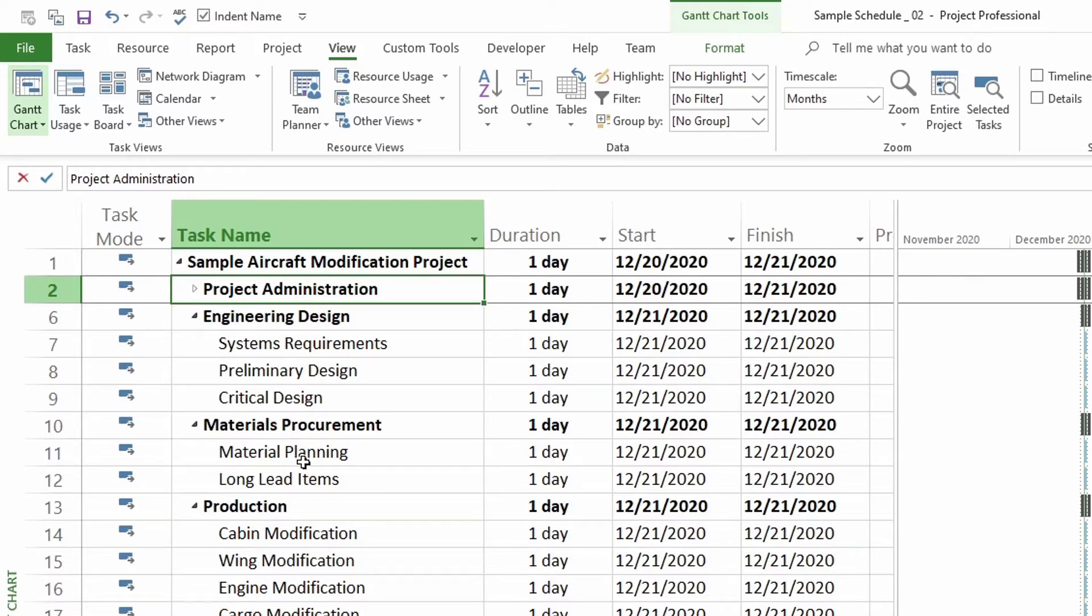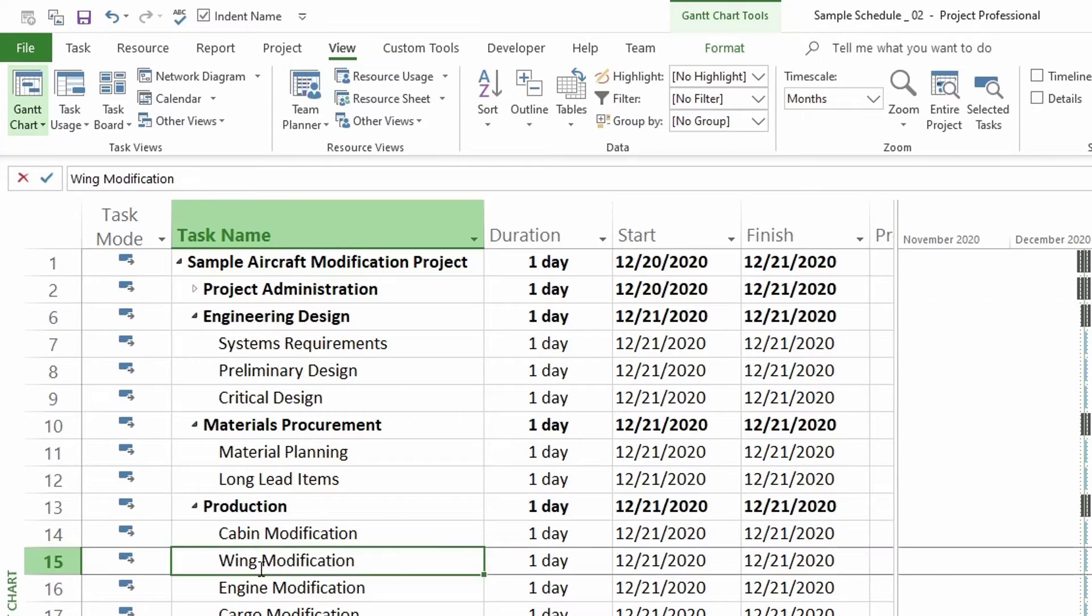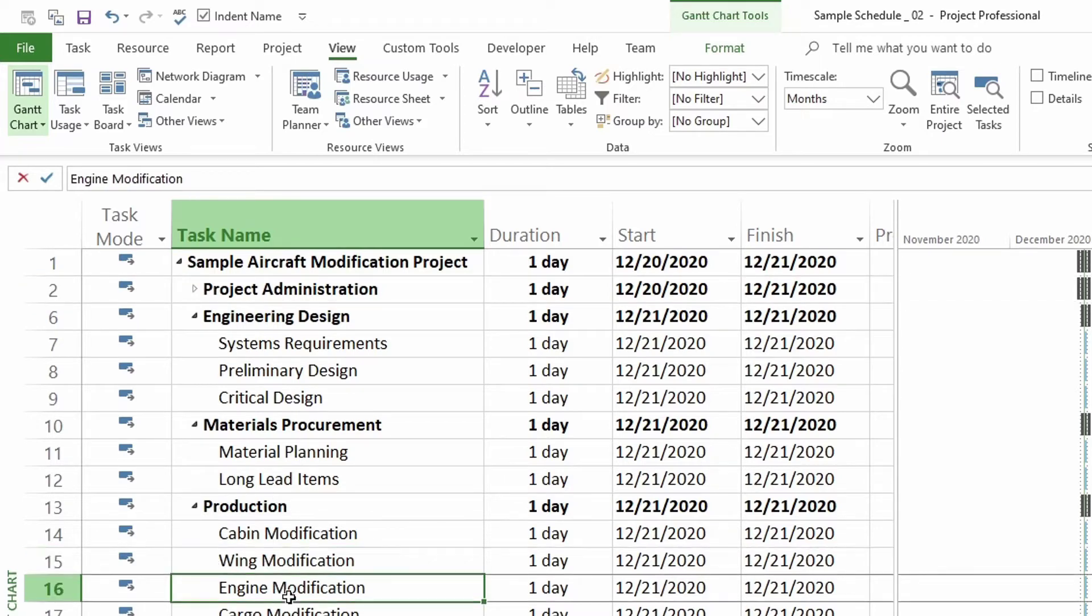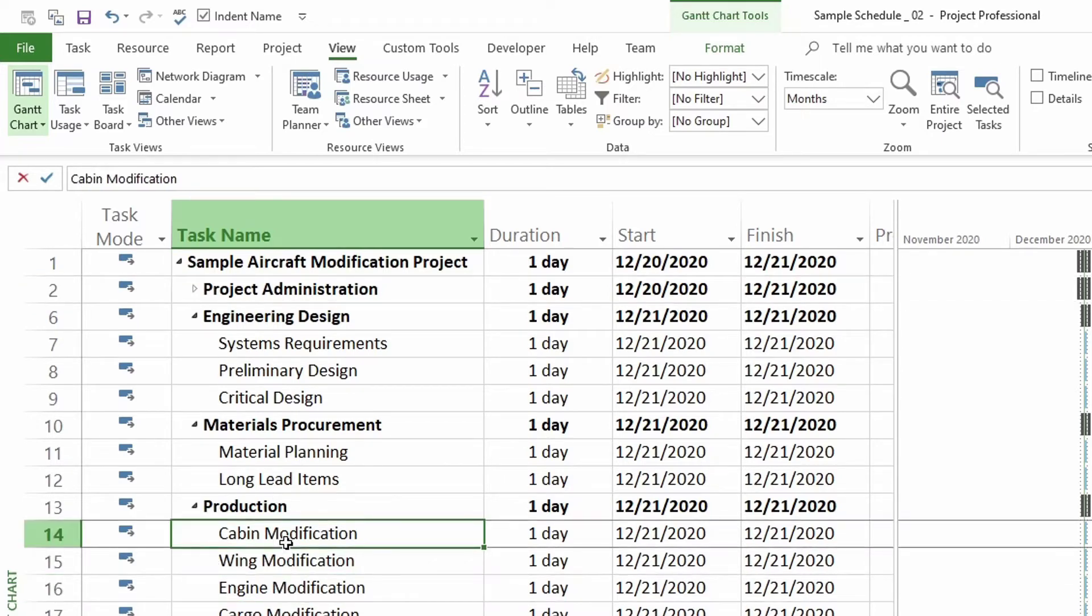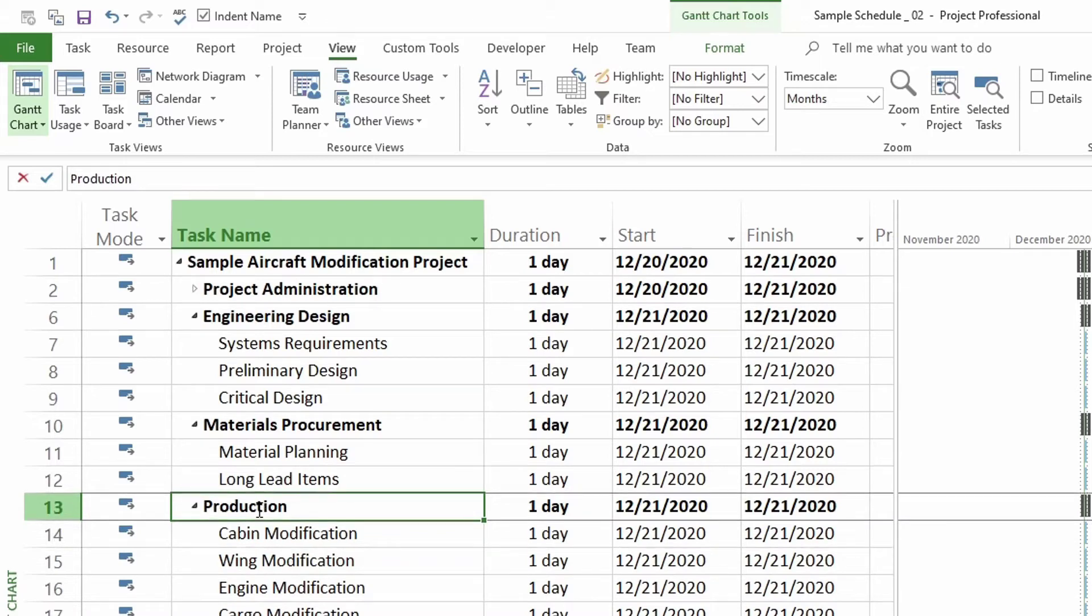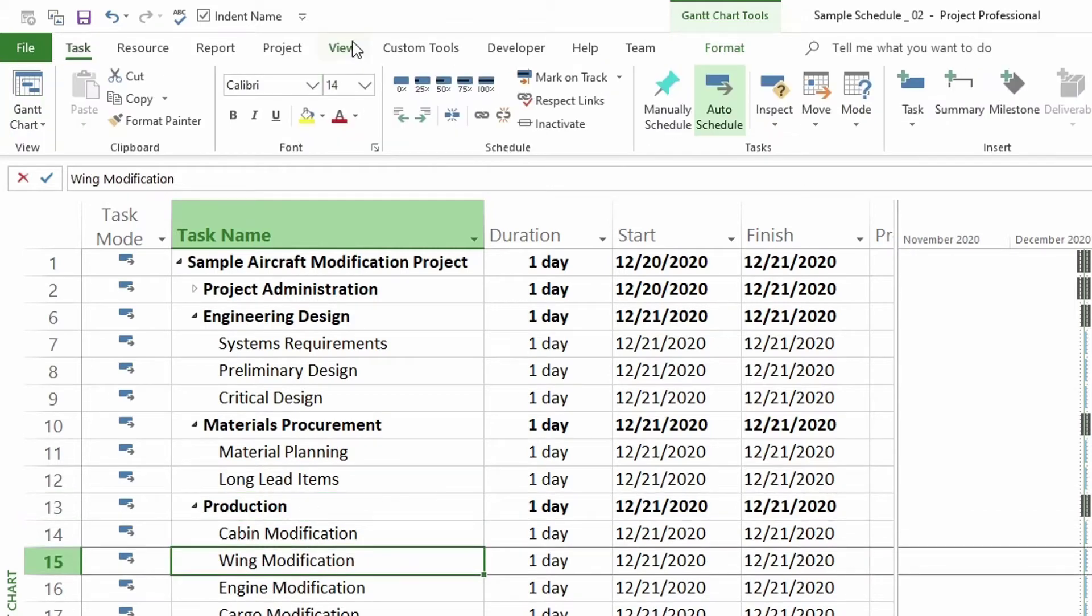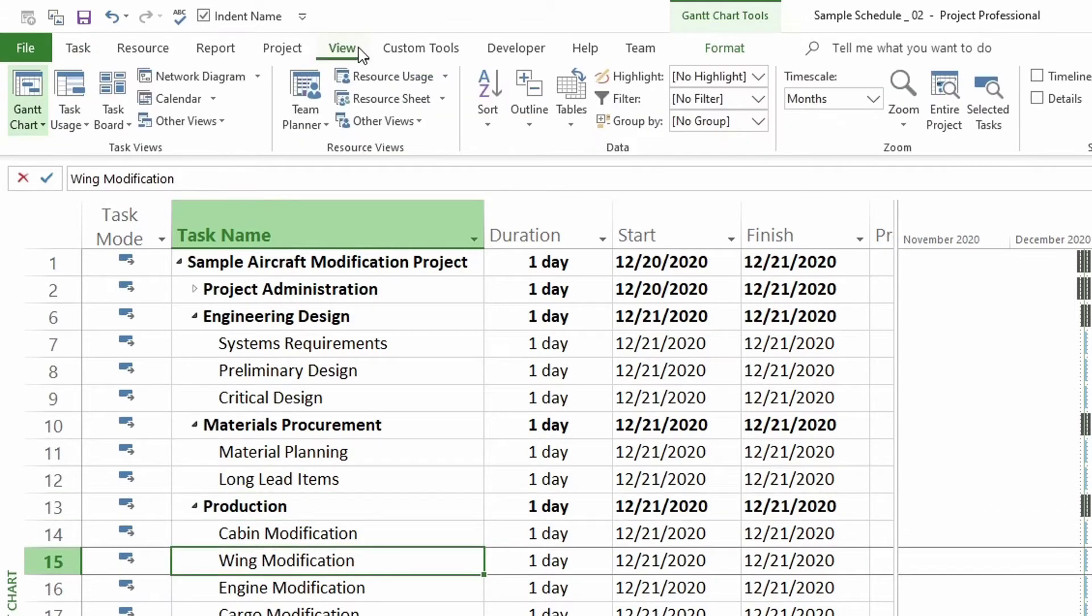So here you can click anywhere. Since I want to roll this up, I can actually click any of these tasks or even the summary task, whichever you want. As long as you're clicking on one of the tasks that are part of the grouping. Then you go to view and then you go to outline right here.